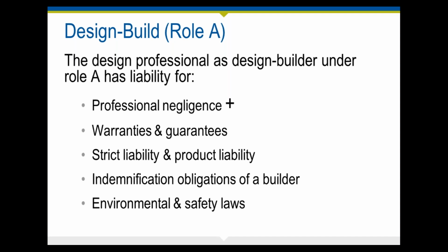As somebody who has assumed responsibility for a site, remember that if there is a sudden collapse, or if there are dangerous activities such as demolition or anything of that nature, and something happens, you may be held responsible under strict liability theories as opposed to the traditional common law negligence concepts, because you are engaged in inherently dangerous activities.